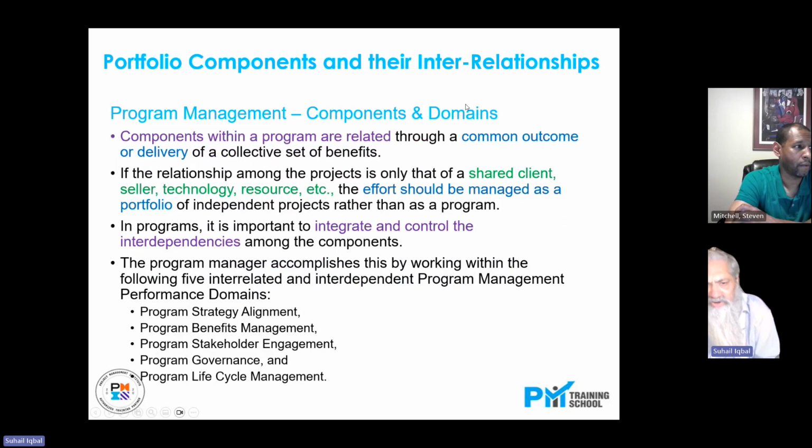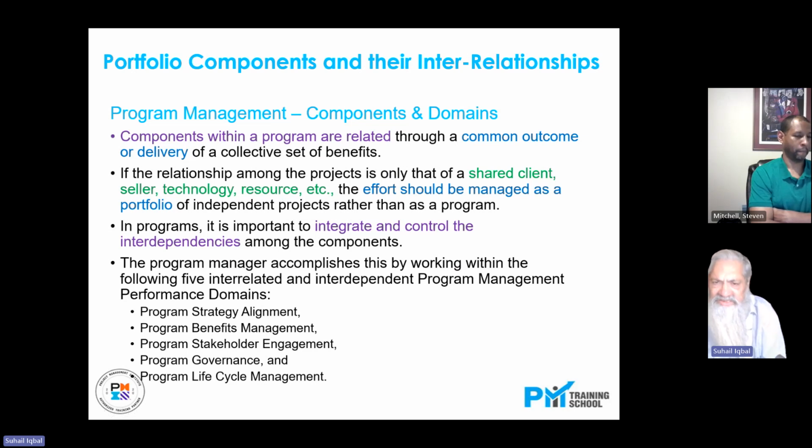Components of the program, I have already told you about that. The relationship amongst the projects is only that of a shared client, seller, technology, or resources. If that is the classification, if in a program all the projects are for the same client, or the same seller, or the technology, or the resources, and that is the reason you are calling it a program, you are wrong. This is not a program. This type of classification is the classification for the portfolio.